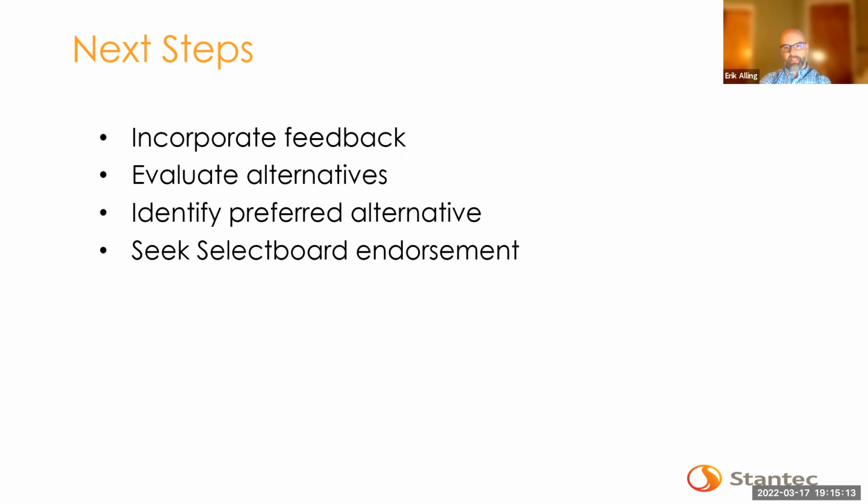Once that's done, we will seek select board endorsement of the preferred alternatives, and then the report gets finalized. If we come out with a preferred alternative for one or all of these segments, we'd be right in line for that grant season in April and May, where these projects could be put forward for state funding.